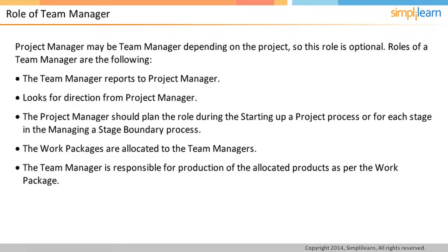One important point to understand is that the structure of the project management team does not necessarily reflect seniority. What is important here is the role on the project. For example, an executive may not have the skills for project assurance, however, should be able to represent the business view clearly. The executive should have the authority to secure funds for the project. The project manager or even a team manager may be more senior in the corporate organization. We will now discuss the role of the project support in the next screen.